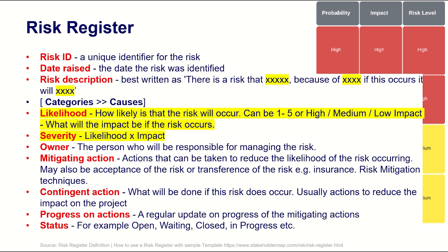You need to identify the likelihood of the risk — how likely it is that the risk will occur. In this slide I'm showing five different scales, but there is also a possibility to have three different scales: high, medium, or low. You can adopt different types of likelihood scales. Then you need to talk about severity, which is calculated by multiplying the likelihood by the impact of the risk.